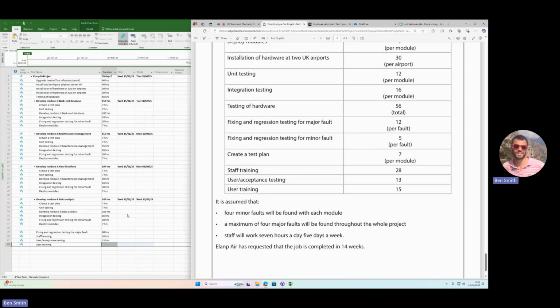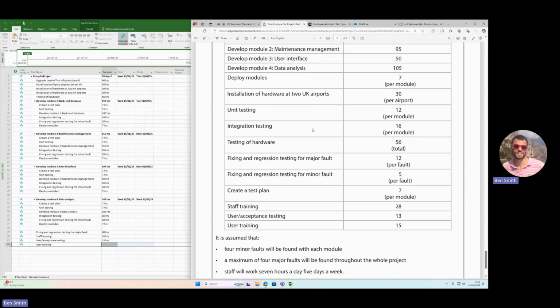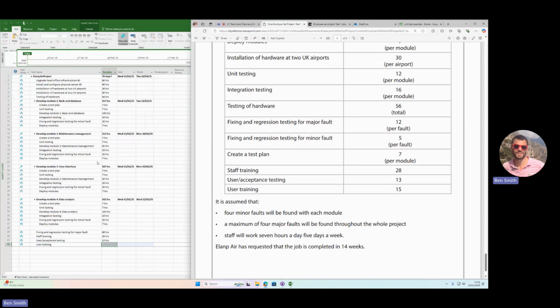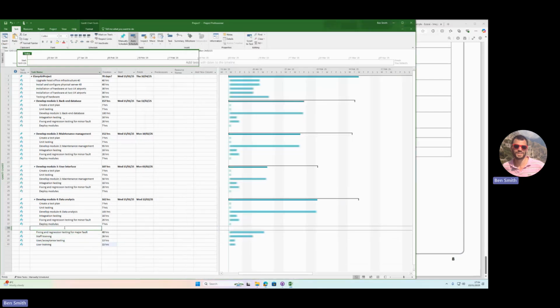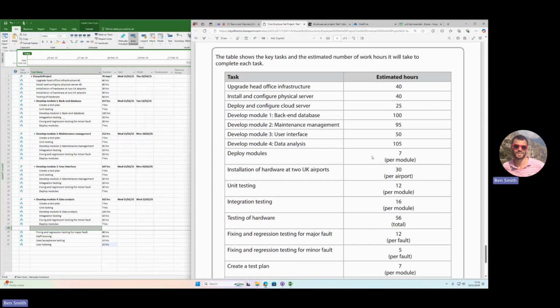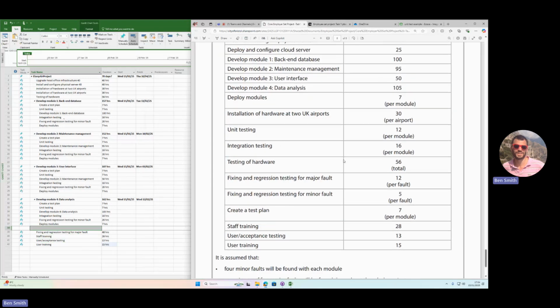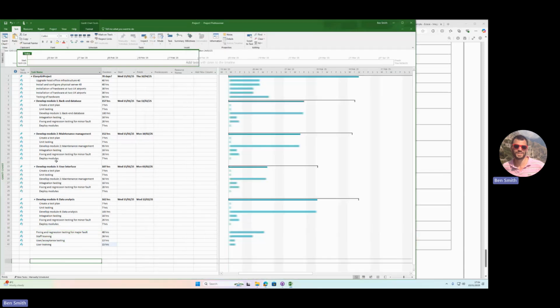to repeat it. Right, so that, from me reading all of this, is how we're going to do the planning out of all the different tasks. And that is the first part of the scenario. You read through it, you look at the different tasks, and then you work out what order they've got to be in and put them into a nice logical thing here so you can understand where things are. Then the next thing we're going to do is assign resources to each of these tasks.